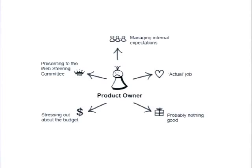They're stressing out about the budget, constant surprises, and just being bombarded with requests from you. If it's too much to handle, you've really got to take that into consideration and figure out how you can reduce what you're expecting of them. Just say, 'Hey, what can we do to make this work? Is a once-a-day email too much? Is a once-a-week email too much?' Give us a really big overview of what you'll accept, and we'll try to take on that role of product owner. In Scrum, the Scrum master can take on the responsibility of product owner if the product owner is not available.